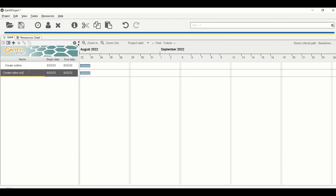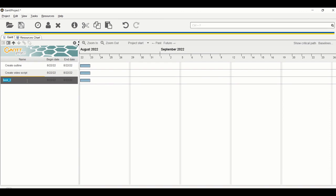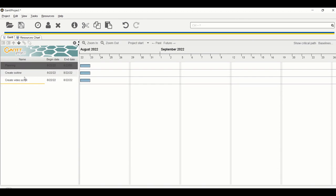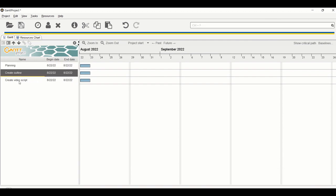Now I want to group tasks into categories. Both 'Create Outline' and 'Create Video Script' belong to the planning phase, so I want to add a 'Planning' category as the parent. Press Ctrl+T to add a new task and name it 'Planning', then use the up arrow to move it above the other tasks.